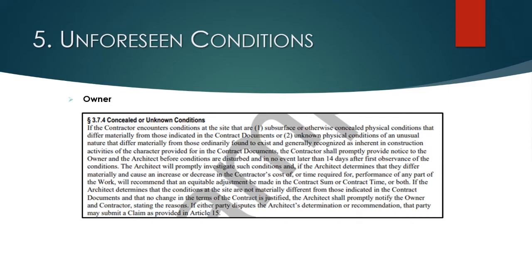So you want to put some burden on the subcontractor to investigate and walk the site and understand the conditions. Similarly, when it comes to the prime contract, there may be some documents that the owner provides you that ties you to the information about the site in those documents, whether they do a soil boring report or they do some sort of subsurface water flow analysis.